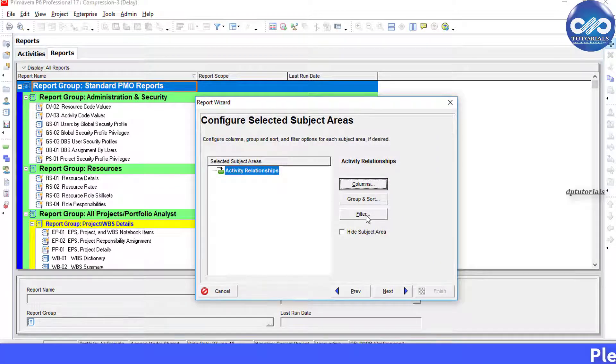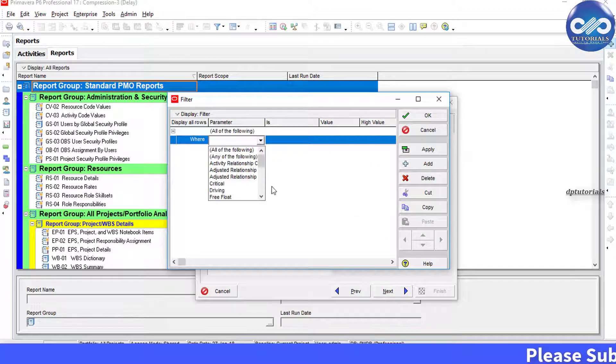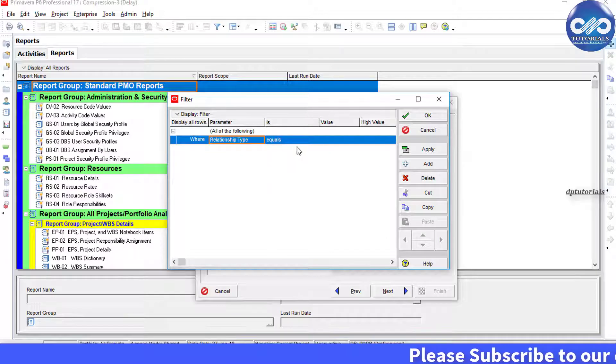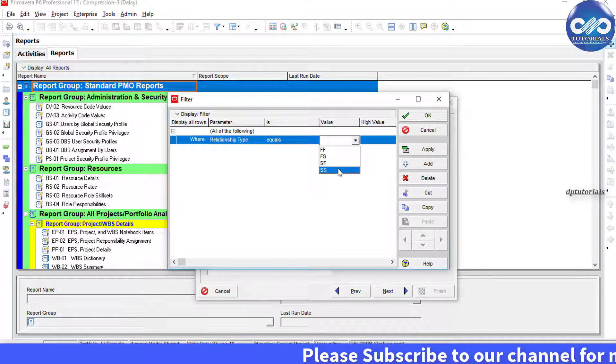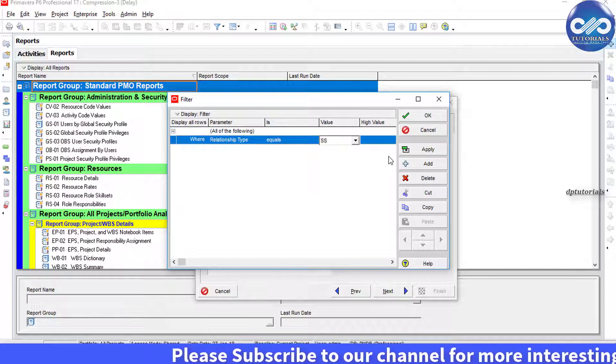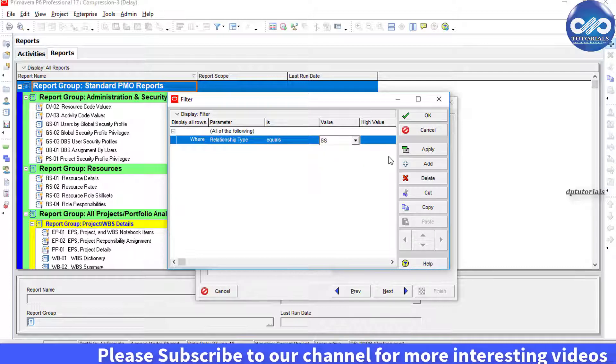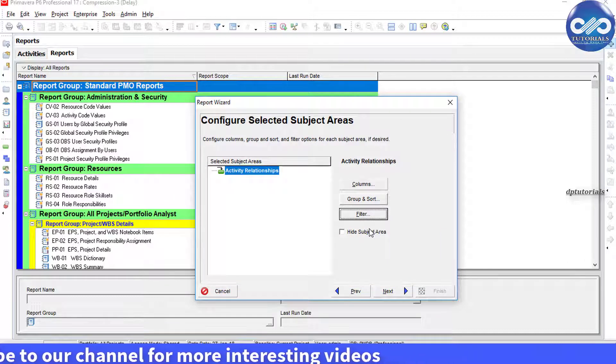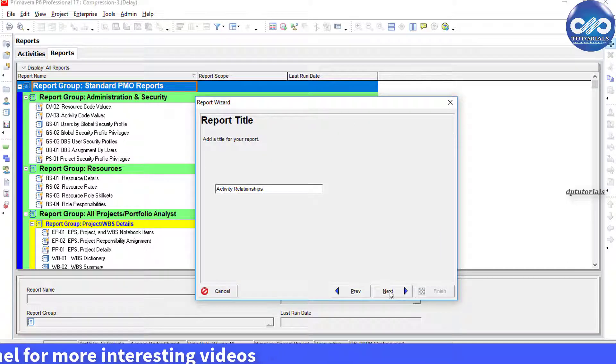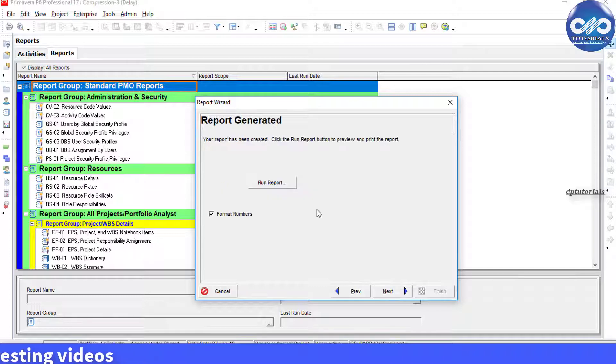Now we click the Filter button to filter based on relationship type. I am selecting the value as SS, that is start to start. Now click OK and Next. We can give the report a title. Then click Next.